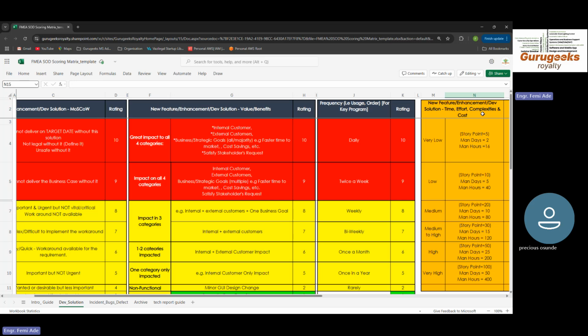What does this mean? This means that in your own Jira ticket, which represents the requirement that you're working on, you must have assessed that particular task and know how many days that task would take you. So, based on the expertise of whoever needs to work on it, you will have worked out the number of days to deliver based on the financial rate card allocated to that particular staff, because every business knows what each staff is worth. So if a staff is earning, let's just say, 1,000 naira per hour, for instance.